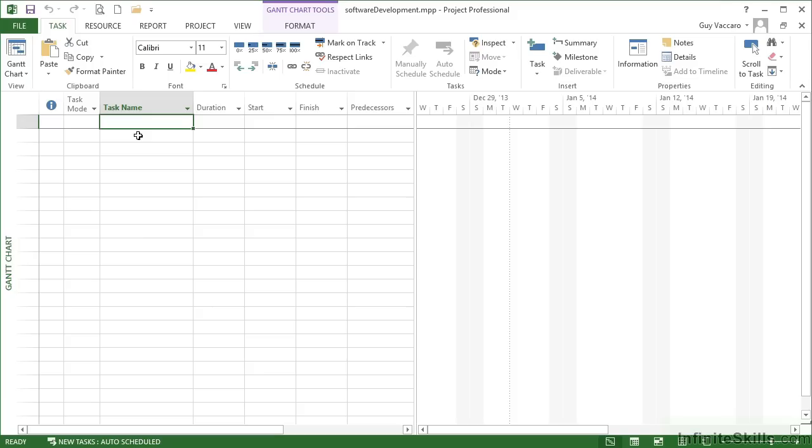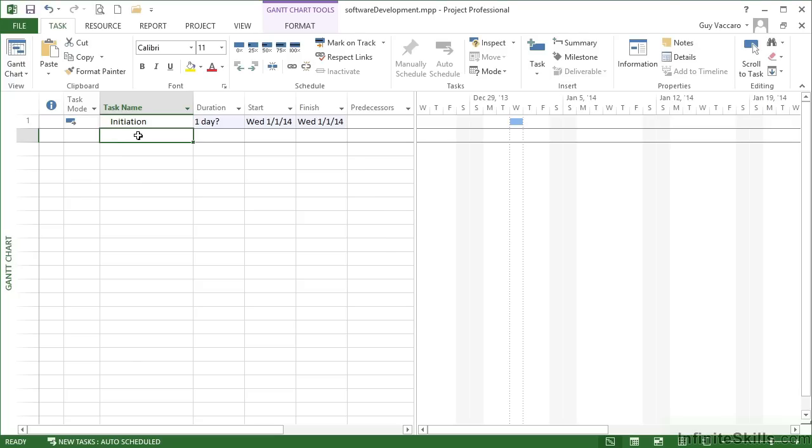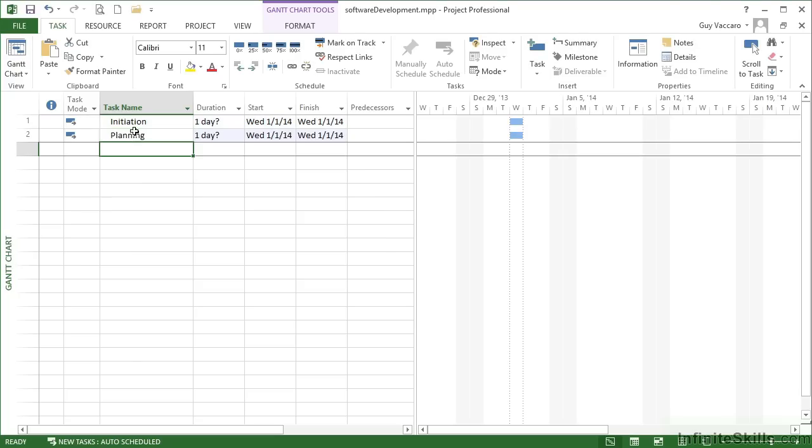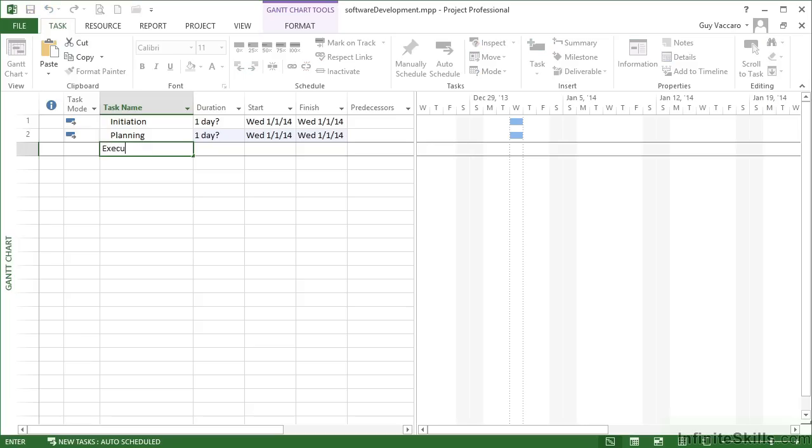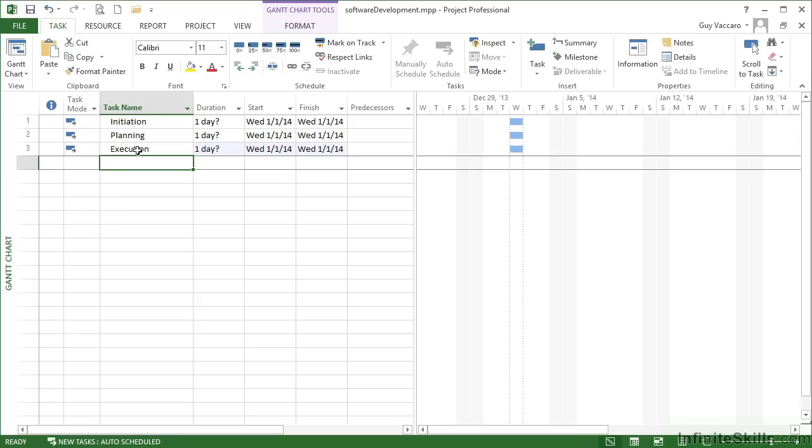To add in my four phases, I simply add them as four task names: initiation, come down to the next task row planning. Because I know that these are to be phase headings, I don't need to worry about the duration here, that will sort itself out. So I'm going to leave that as the default, which is actually an estimated day. Third is execution, and then the fourth is close.